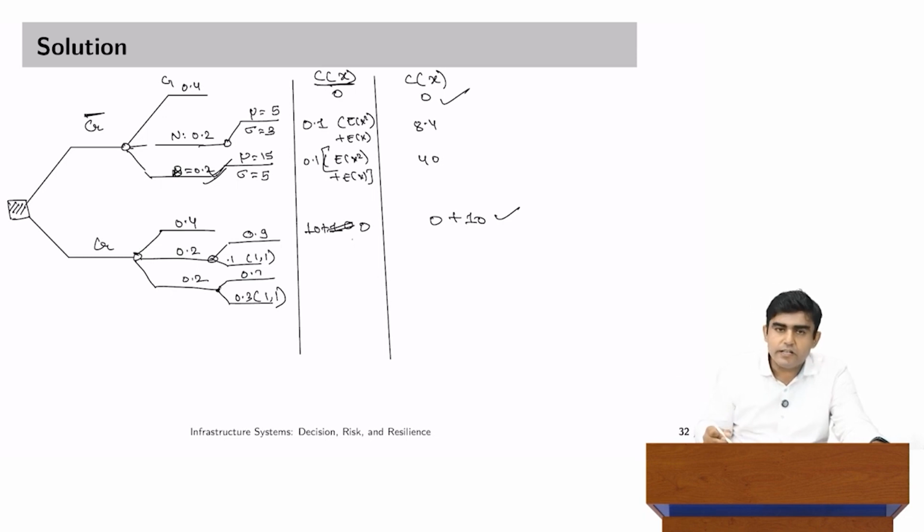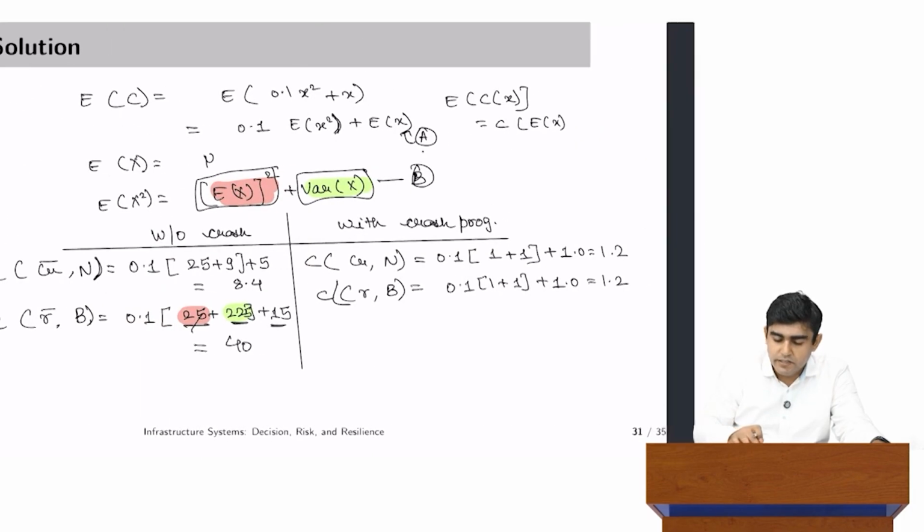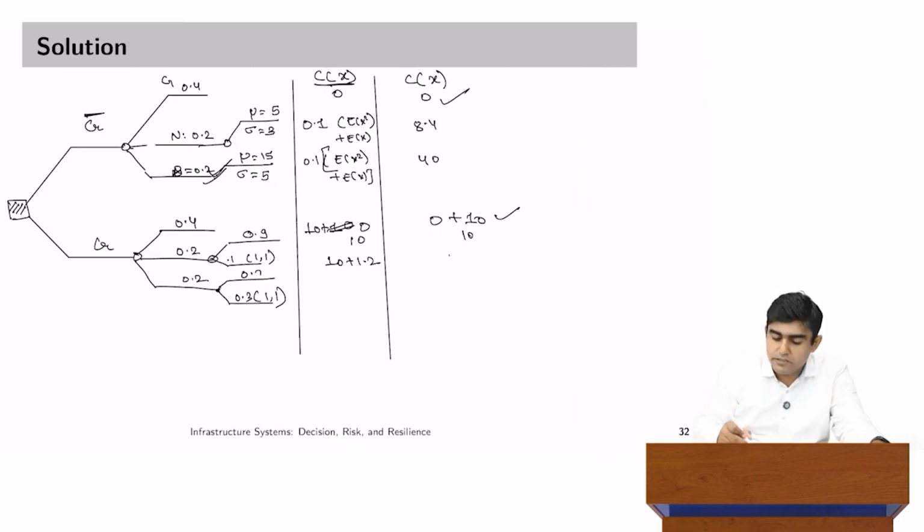Now, when we go to the second case, let us say there is a 20% chance weather persists to be normal, then good. Then there is a 90% chance that these resources will not come in use, but still you have deployed. So, cost of 10 will come into picture, and then with 10% chance the cost of 10 plus 1.2, remember we calculated this 1.2 earlier, that 1.2 cost has to be incurred. So, the total number comes out to be 11.2. Similarly, in the second case, 70% chance extra resources were not needed, you still deployed, 11.2 and 11.2.